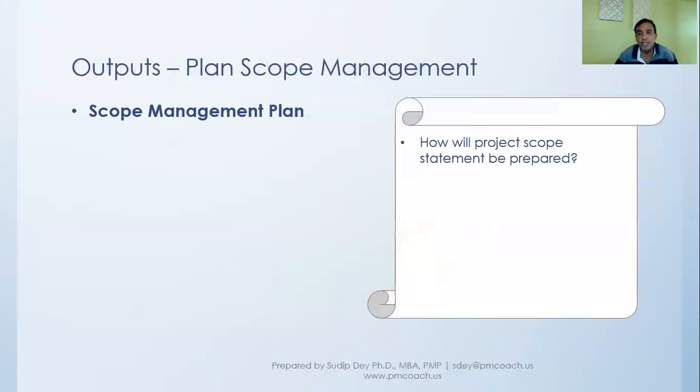And in fact, we'll see this project scope statement is a component of the scope baseline. This is what we'll look at in the scope management plan. Then how the WBS will be created from the scope statement, so the process that we'll follow in creating the work breakdown structure from the scope statement.